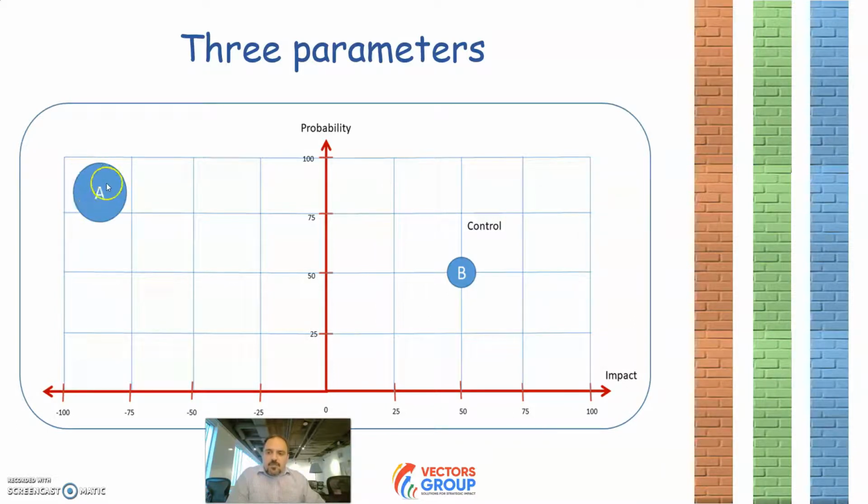But this is something you can control. You can offer her some additional compensation, some benefits, recognition, or a promotion, or you can look for another specialist. So you have lots of things that you can do to deal with risk A.